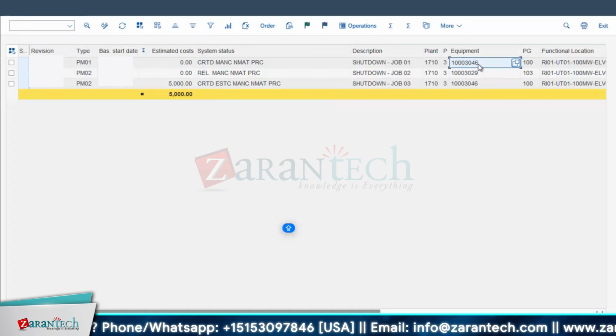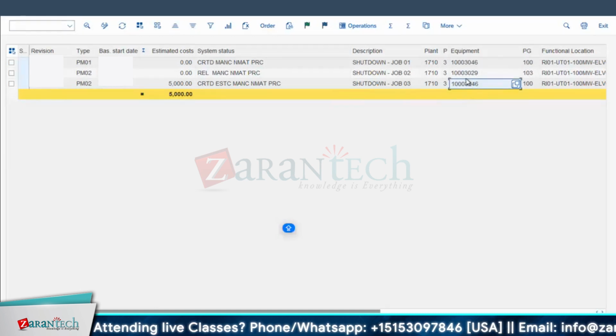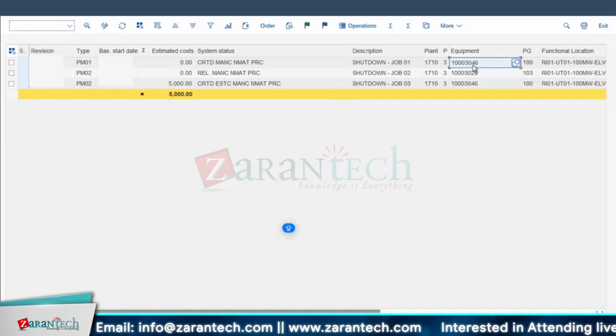Here that concept is superior order in SAP. Or suborder. I will create a superior order, and I'll keep creating suborders. Now suborder cost, example say here 100 and here 100, 200. Individually it is 100, 100. Anyway, you have a breakup, it will get summed up and it will be shown over here. Means settled to this order. Means consumption will be shown to this particular order. Okay, here what you said is parent order, right? Here in SAP it is called superior order. You can relate that concept to your superior order and suborder.